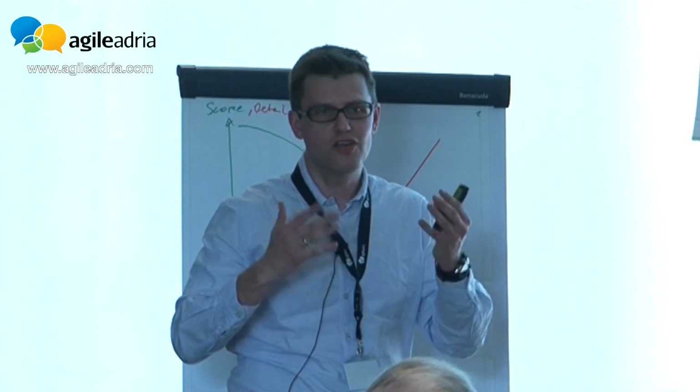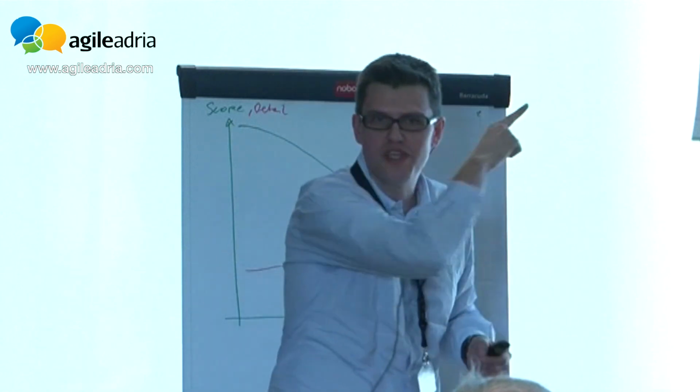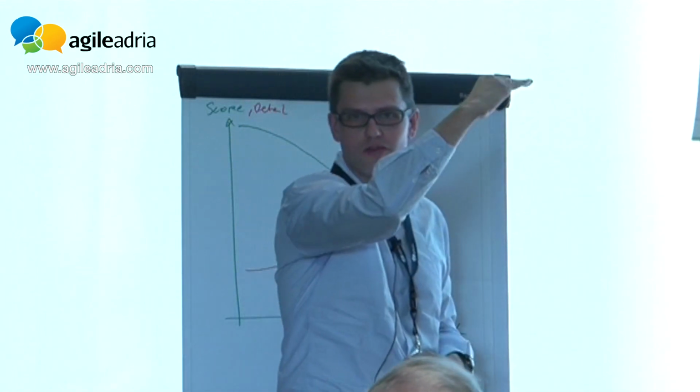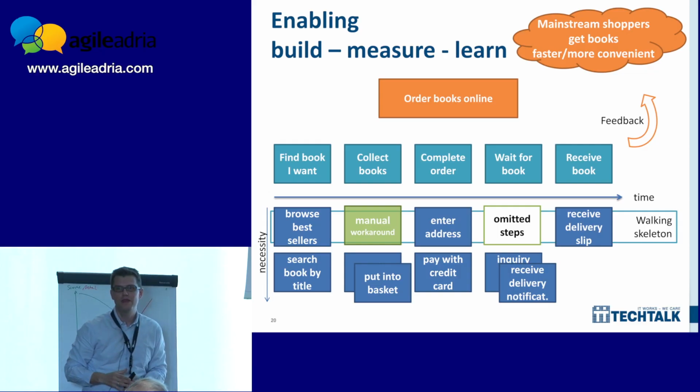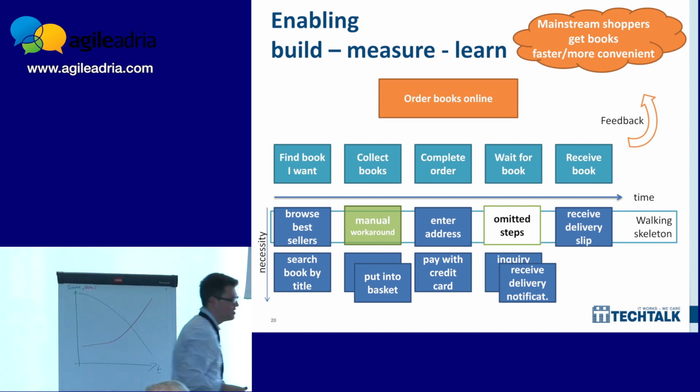So when you run out of budget, you are not at step 3 and cannot support anything, but you have probably worked down several layers already in your map and have delivered already something valuable. So it not only helps you with the feedback, but also delivering something valuable, no matter when you have